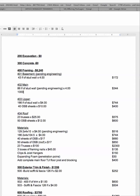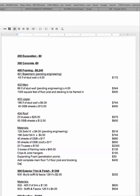Labor is 1,000 square feet of floor, joist, and decking to be framed in. And that's at $4 a square foot, so that'll be about $400 as well. You'll notice too a lot of times that the cost of the materials and the labor is pretty close. This is actually the decking. The TGI should be about that, and then the decking, which is 3/4 inch tongue and groove, 4x8 sheets. That's going to be about, unfortunately, $1 a foot. So it's going to be about $1,000. I go over by a little bit, so it's $1,200.